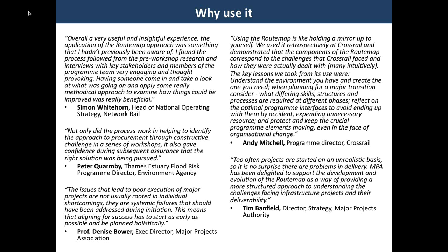For example, in the first application at Crossrail, the learning they took as an organization from the approach included how understanding the environment you have gives you the opportunity to create the one you need. Also, when planning for a major transition, like that from design to construction, consider what differing skills, organizational structures, and processes are required at the different phases. And the most important part of that is what lead times they require to be established. And also they learned to reflect on the optimal program interfaces to avoid ending up with them by accident, expending unnecessary resource, i.e. don't let predetermined delivery model drive your decision making.